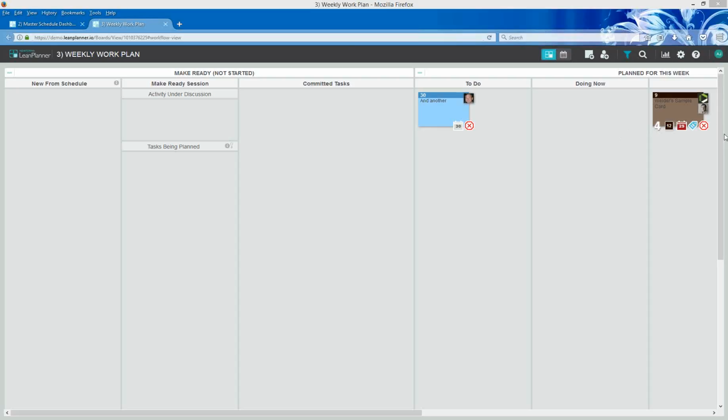And I know that Jim and Jesse talked to you guys about how we manage our project schedule and how we could incorporate the task and how it adjusts with dates if we don't hit it. So that's how we are watching our schedule and our tasks on submittals. And we've used New Forma on other projects too. We use Prolog in-house, but we also have our own submittal spreadsheets that keep everyone up to date on where we are and what our timing is when it comes in.